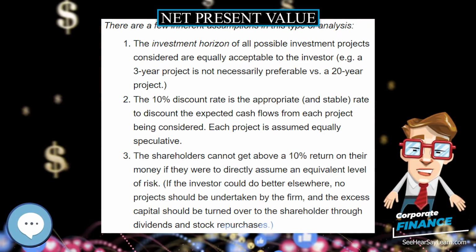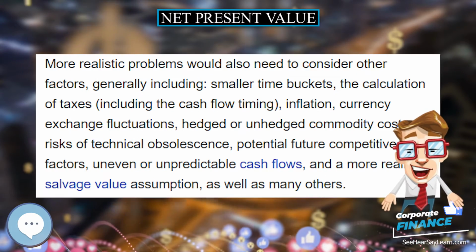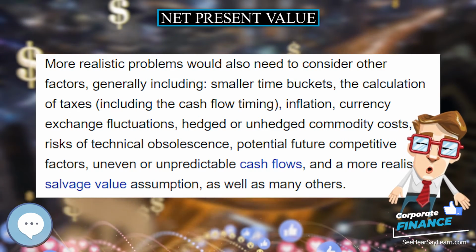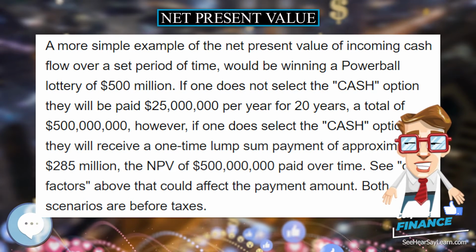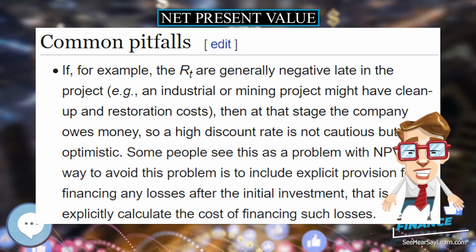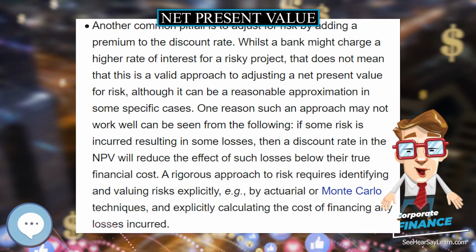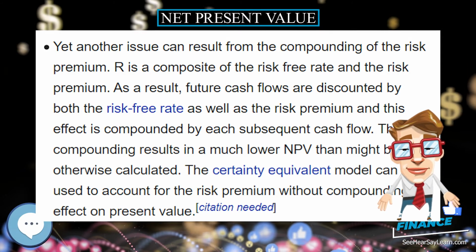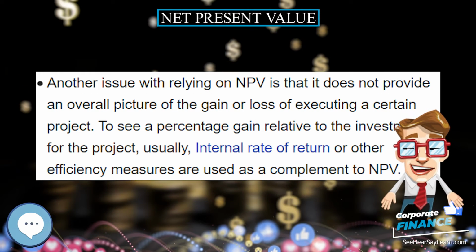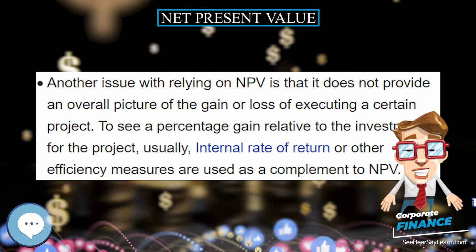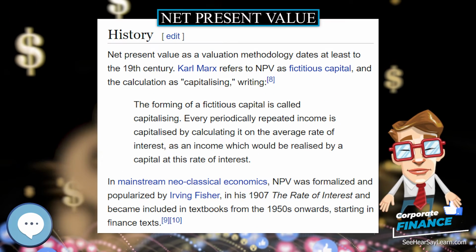This also makes the simplifying assumption that the net cash received or paid is lumped into a single transaction occurring on the last day of each year. At the end of the 12 years the product no longer provides any cash flow and is discontinued without any additional costs. Assume that the effective annual discount rate is 10%. The present value at t equals 0 can be calculated for each year. The total present value of the incoming cash flows is $68,136.91. The total present value of the outgoing cash flows is simply the $100,000 at time t equals 0.